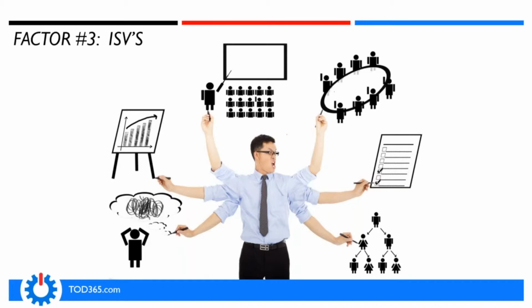And then you have to go out and check to make sure that the ISV actually can give you referenceable accounts where they have actually upgraded with a customer. On a recent project, we had a very strong, technically great ISV that, when we talked to them about the upgrade project with our customer, quoted a price of X to reinstall their solution, and 3 times X to attempt an upgrade, because the risk for them, they thought, to do an upgrade as part of the customer's environment was so great that they wanted to charge a huge premium to attempt an upgrade as opposed to re-implementation.